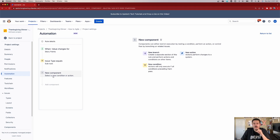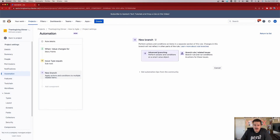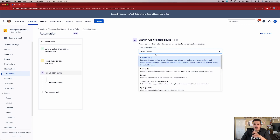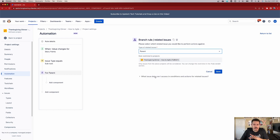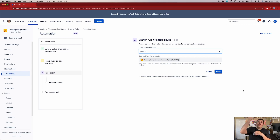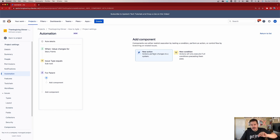Now this is where things get a little more advanced. Automation rules in Jira are really sophisticated and you can do some advanced things — this is just scratching the surface. What we're going to do is add a new branch using 'Branch rules / related issues,' and then under types of related issues we're going to look for 'parent.' This parent is the direct parent we want — the story above the subtask. There's another parent option for the epic level, but since we want to go from subtask to story, we'll pick just 'parent.' This basically says: I'm a child subtask, and whatever I'm doing, I'm going to influence my parent — rolling the value upward.